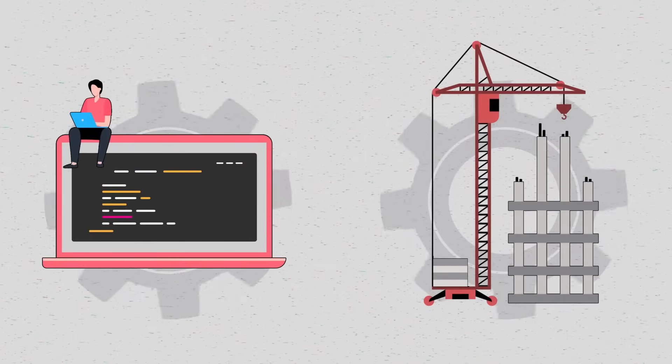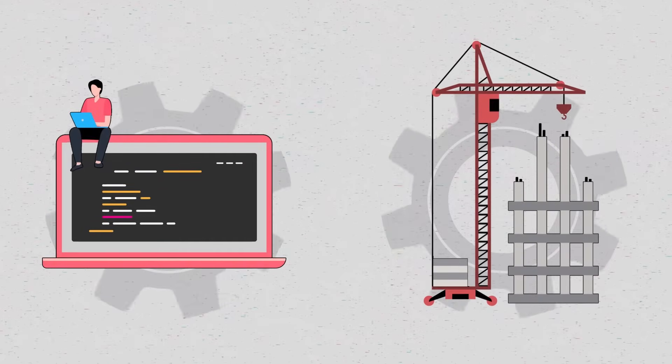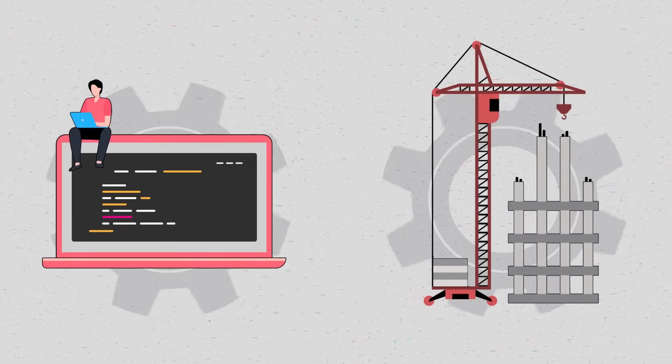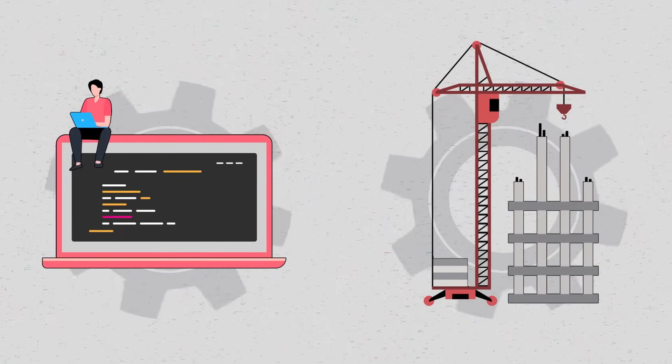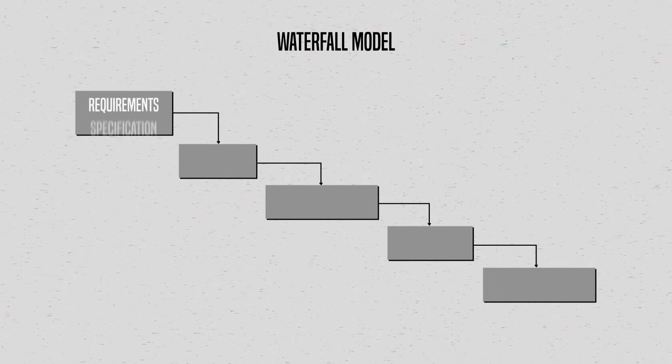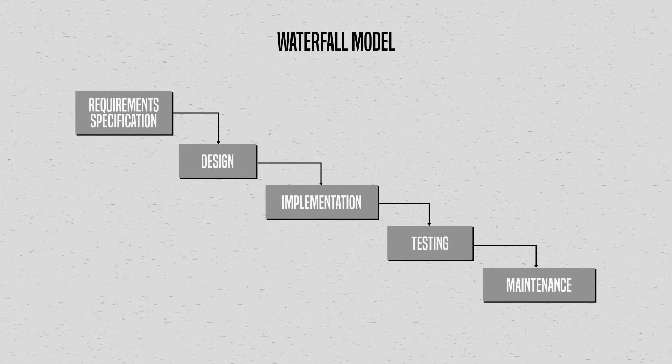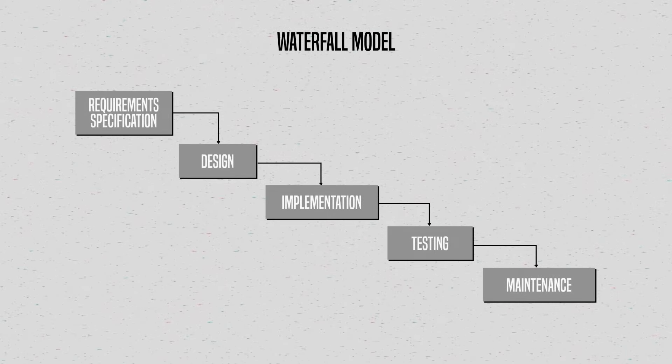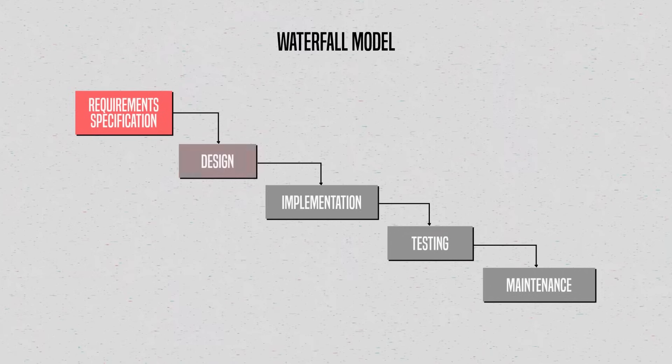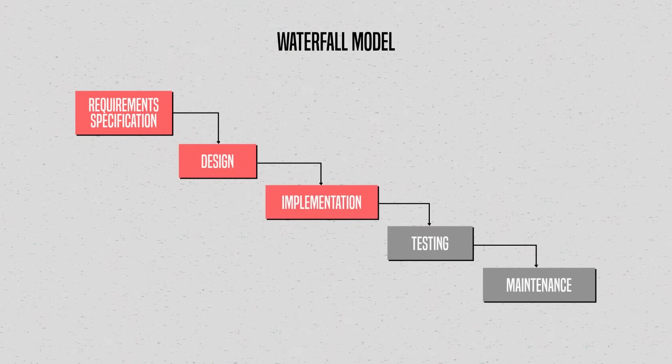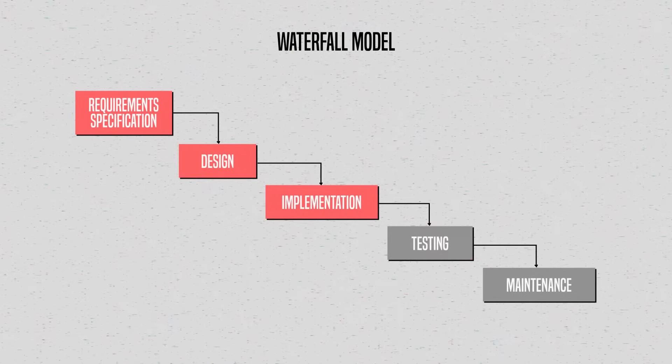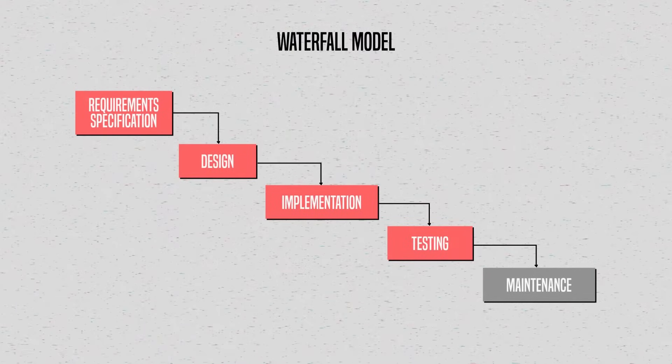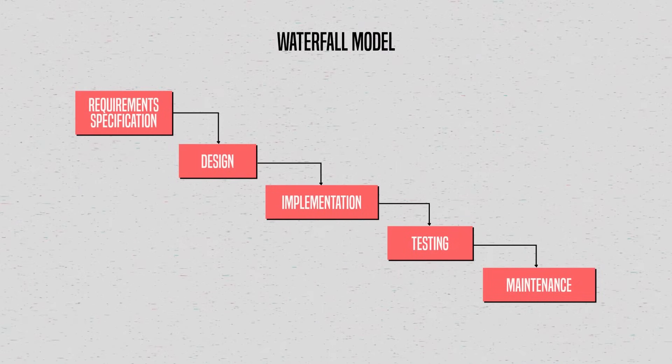That's why, in continuation of the practice, for many decades, software products were built like tangible ones. Look at the now discredited waterfall model. According to it, the project should follow a few consecutive steps: gathering product requirements, preparing the design, then implementing said design, doing some testing, and finally performing maintenance and system support.